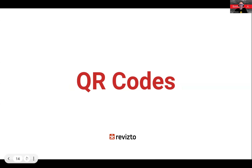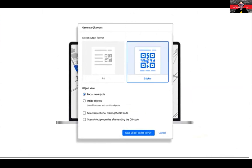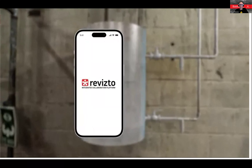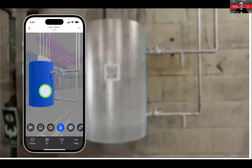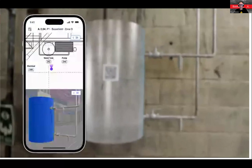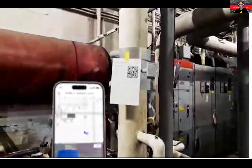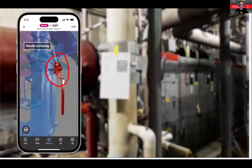QR codes are brand new and have been introduced in 5.14. Previously you could generate QR codes using a URL for an issue and a third-party website, but now you can do it all from within the Revisto app itself. One option is physically printing QR codes and attaching them to equipment on site — your site team can scan them to access all the information in the Revisto model. These QR codes can also link to specific issues, empowering people to contribute to markups and update statuses.